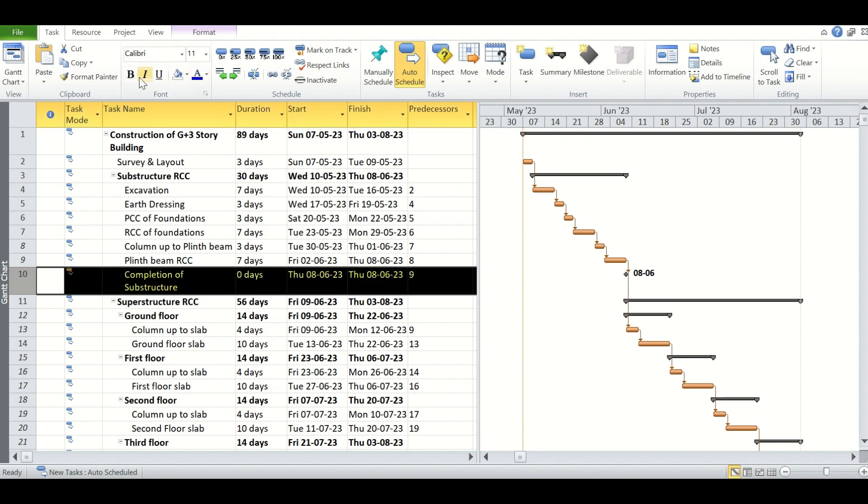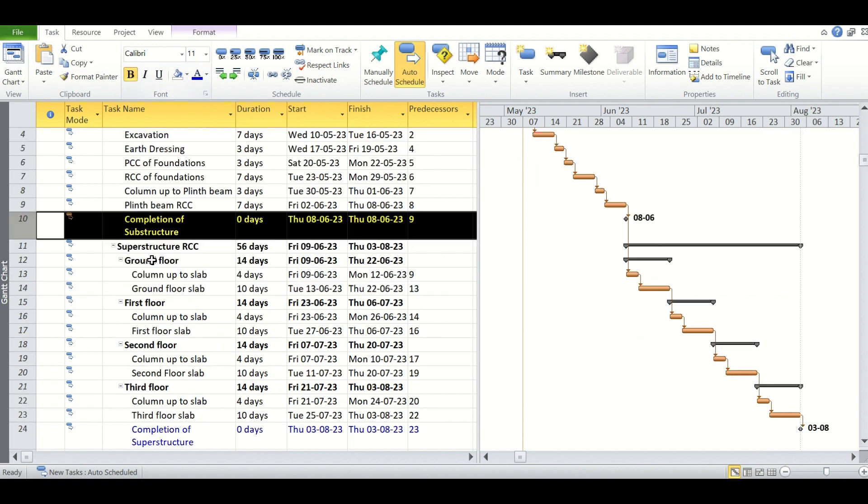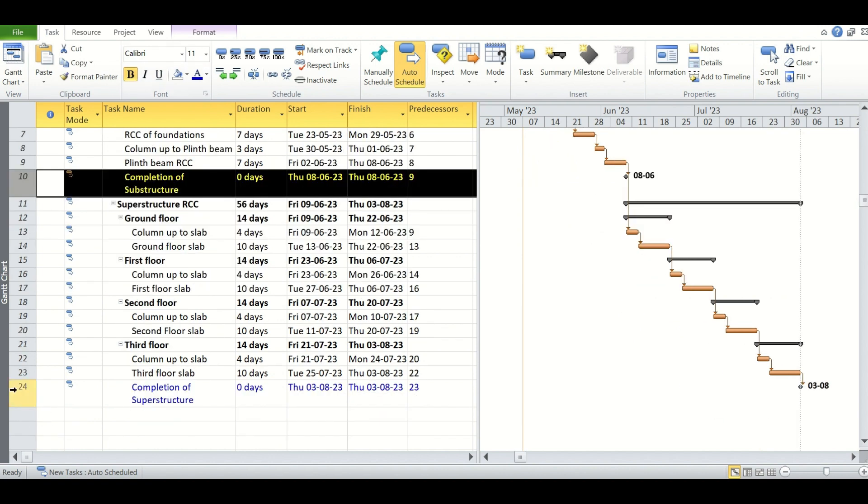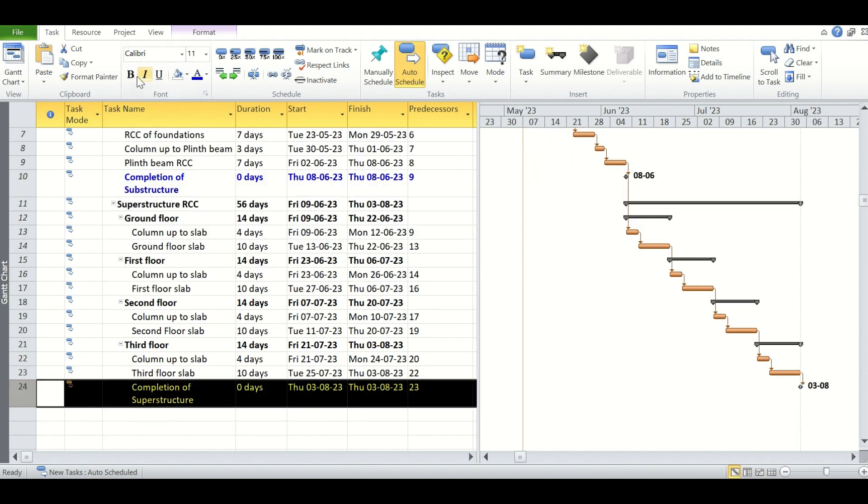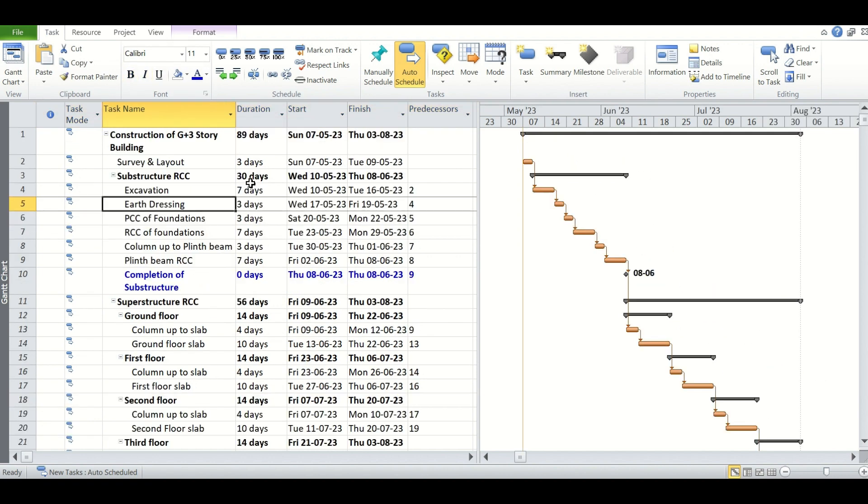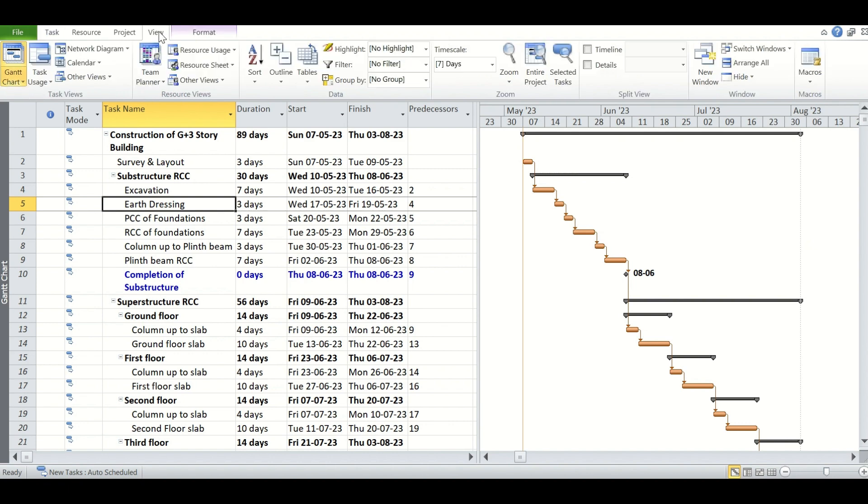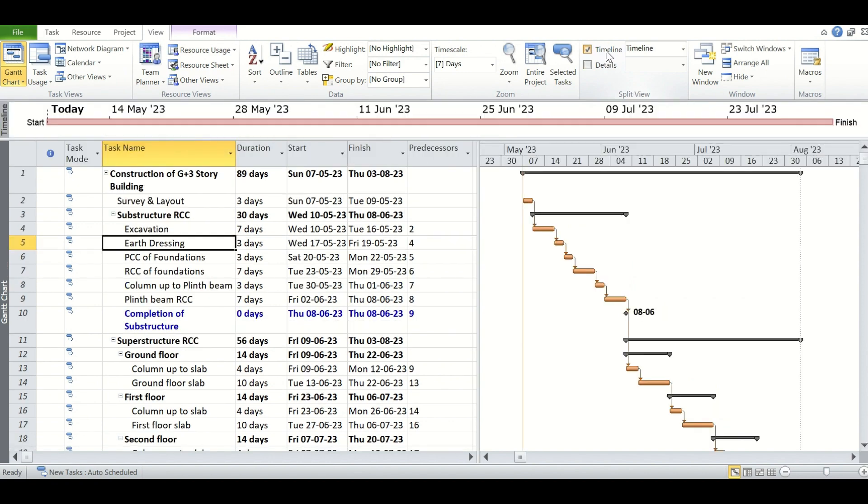One is the completion of substructures and another is the completion of superstructures. You can see the Gantt chart on the right hand side. We will see how to insert the timeline. For inserting the timeline, we will simply go to the View tab from the top ribbon, and here in the split view portion we will simply check on the timeline option.